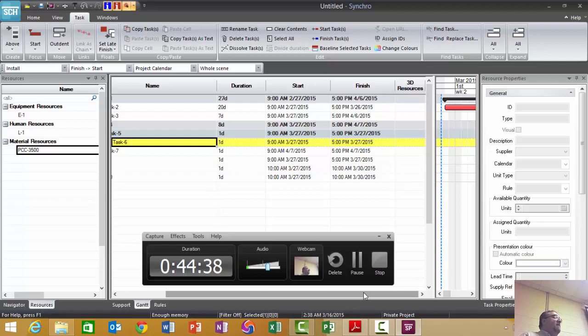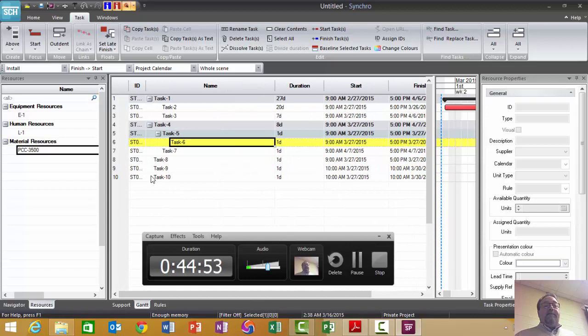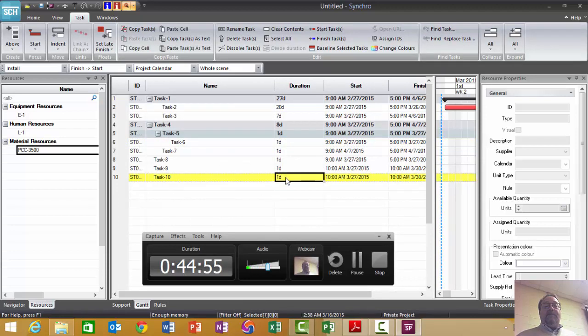Okay. So you can start off, you don't have to put this in your work breakdown structure for the estimate, but in the schedule you might want to put in a milestone. What's a milestone? It's a 0 duration activity. See what happens if I put 0 in here.